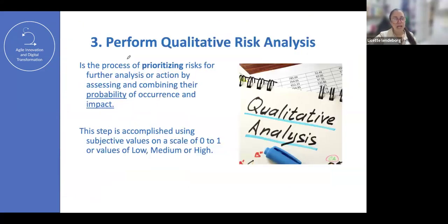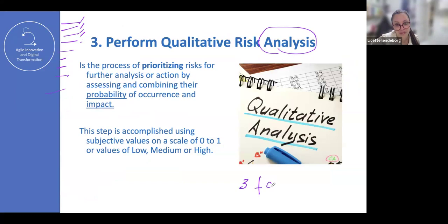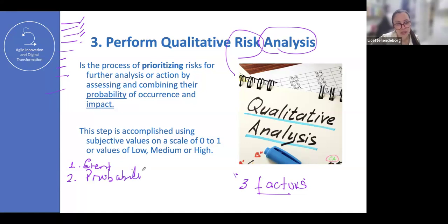That's it. So now that I have the list of risks here, my risk register, now I need to analyze each one of those events based on the 3 factors that I gave you last week. I think I told you that for every single risk event, you need to identify the 3 factors. Number 1, the event, the description of the event. Number 2, the probability. Pay attention because this makes sense. You'll see. I'm taking you to a place right now. Event, probability. And number 3, impact.